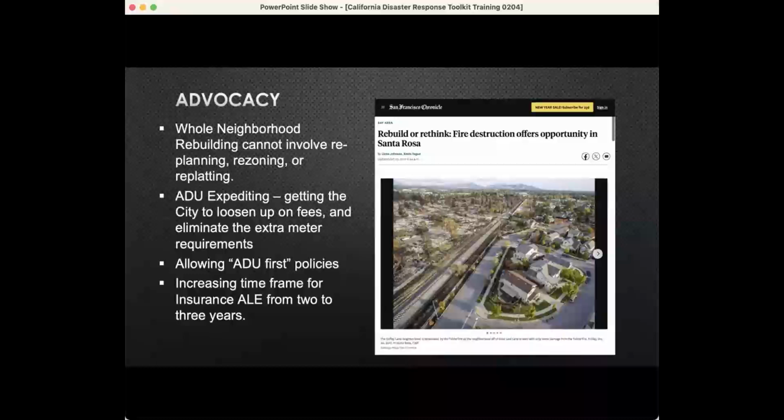After the disaster, each lot is owned individually. The infrastructure like planning approvals, easements, roads, and utilities are in place. There is no mechanism or money for changing those items. Insurance does not pay for reworking infrastructure. It only pays to rebuild the structure.